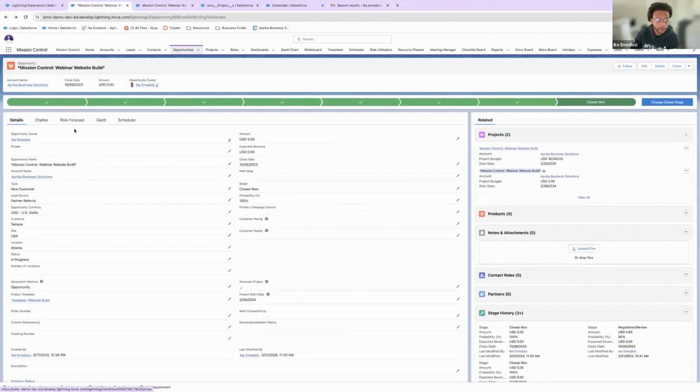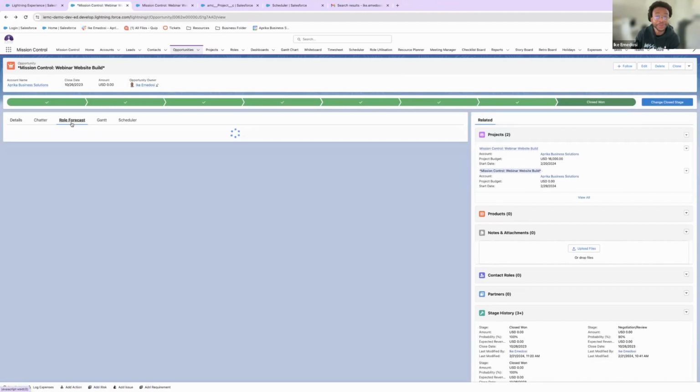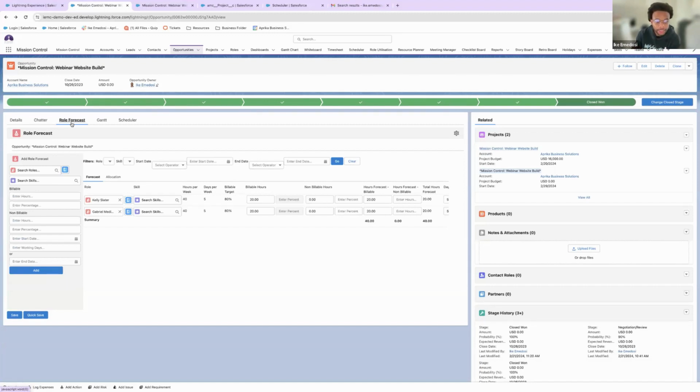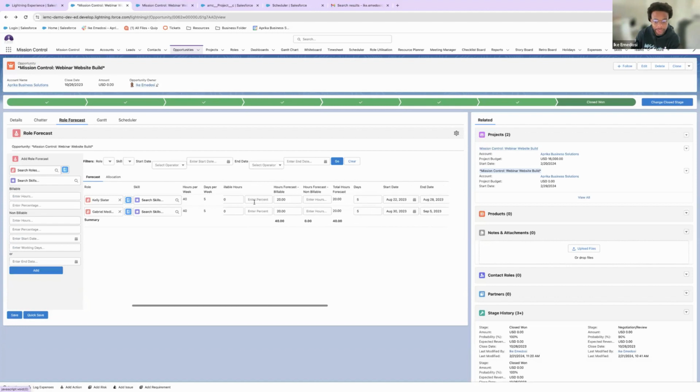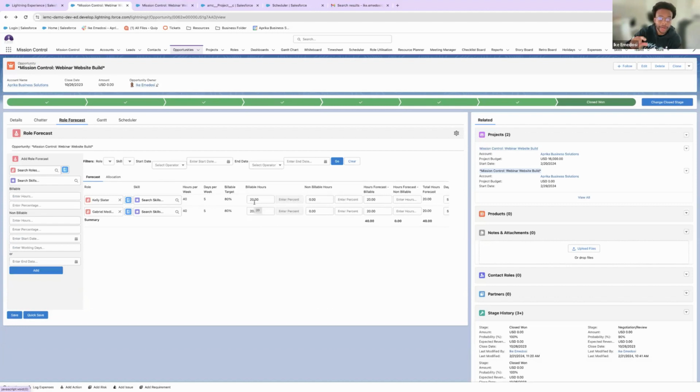All right. Also, something to note, I won't spend too much time on it, but if you want to see what resources are available to you from the project management side, so this is the sales side, vetting out an opportunity, but if you want to take a peek and collaborate with the project management side, you can use our role forecasting option here that says, all right, for this opportunity, I know I'm going to need Kelly Slater and Gabriel Medina. I want to make sure they are available to work this project. And once we see that they are available to work said project for the day specified, we can go ahead and create this opportunity and make it a project in confidence, knowing that we have project management team members available to work this opportunity that became a project.